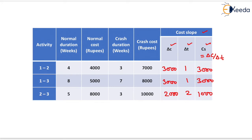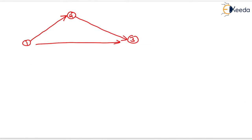We will now draw the network diagram as per the conditions given in the question. Event 1 is shown here, event 2 is shown here, and event 3 is shown here. The normal duration between events 1 and 2 is 4 weeks with a crash duration of 3; between 2 and 3 it is 5 and 3; and between 1 and 3 it is 8 and 7.